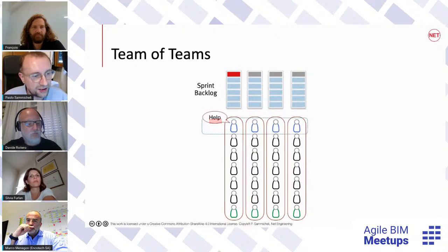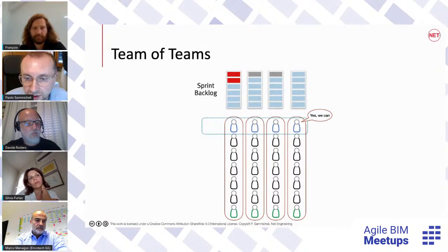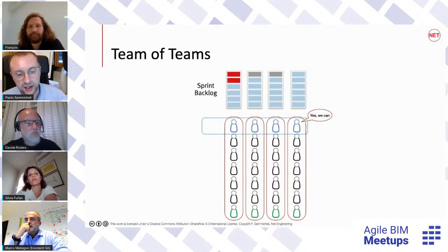But since we are a team of teams working together and helping each other, we can ask for help, and somebody can accommodate some work in their buffer, freeing up the space for dealing also with this new emergency that arose during the sprint. So having the interruption pattern in every sprint backlog allows multiple teams to be reactive during the sprint. It's like the definition of team of teams, helping each other and being able to quickly react to the